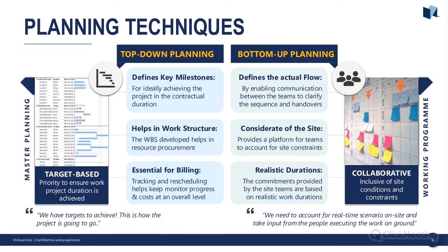So the two planning techniques I'm going to talk about today, as mentioned, we'll start with the top-down planning approach, and that's very target-based. So at a very early stage, probably at the tender stage, the key milestones and durations are met, and this is normally a contractual agreement.